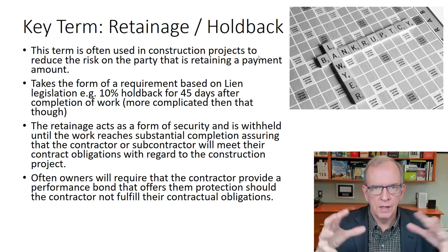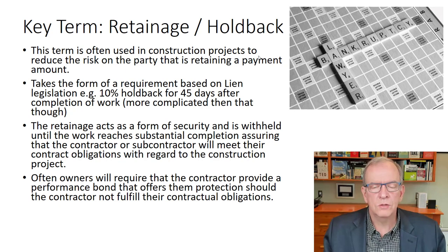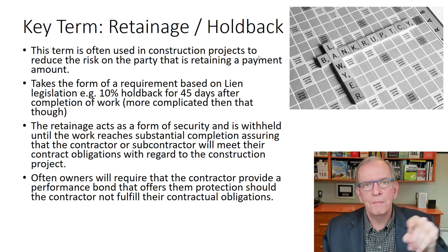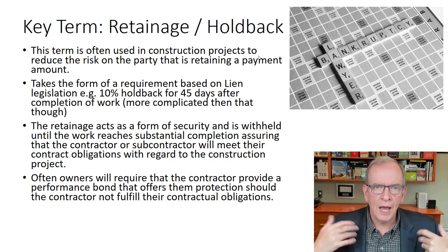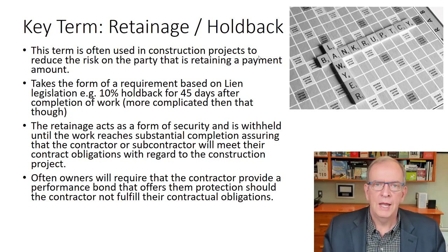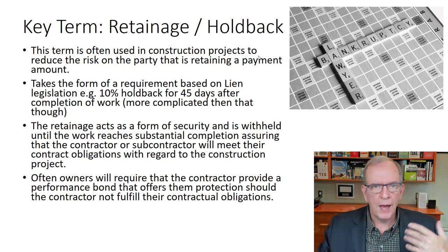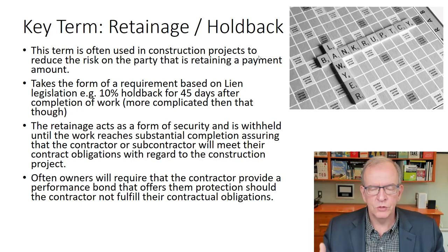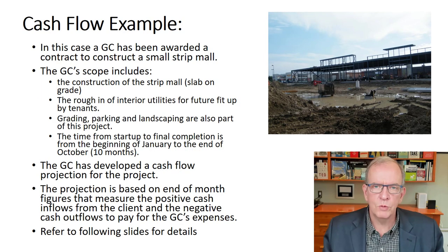So it is kind of a complex web that is required for those purposes, because maybe your subtrade has another subtrade that they didn't pay, so they would be able to file a lien in that case. So those are protections that are put in place, but it does somewhat make your cash flow situation more complex as well, because if you don't consider that and you don't fully hold back what you're supposed to hold back from your subtrades, you're for sure going to be in a negative position. And it's always difficult to get into a positive position for those reasons.